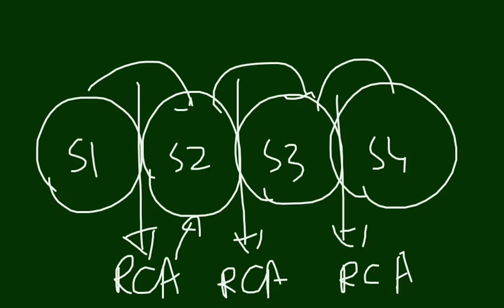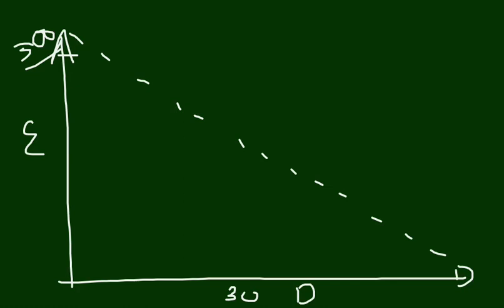So we can confidently assume that we have the burn down chart coming in as an input. When we look at a sprint burn down chart, it looks like this. We have the y-axis, which has the effort to complete the sprint, and on the x-axis we have the duration of the sprint. So if this is a 30-day duration, and this is, let's say, 300 man days to complete the sprint, the ideal curve is supposed to look like this. That means as the sprint progresses, the balance effort to complete the balance activities should reduce, and it should become zero at the end of the 30th day or at the end of the iteration.